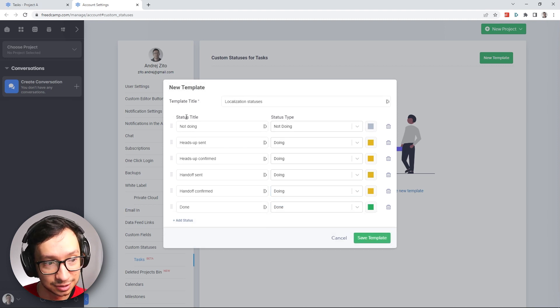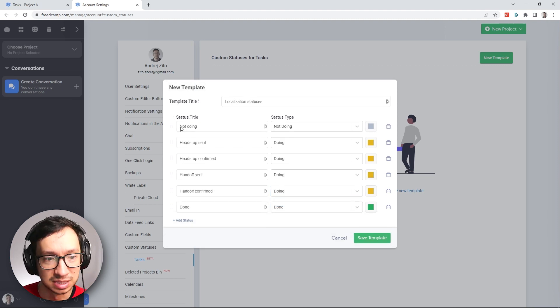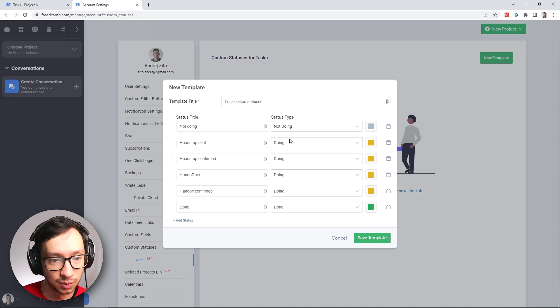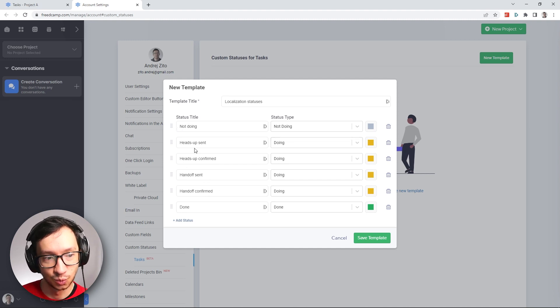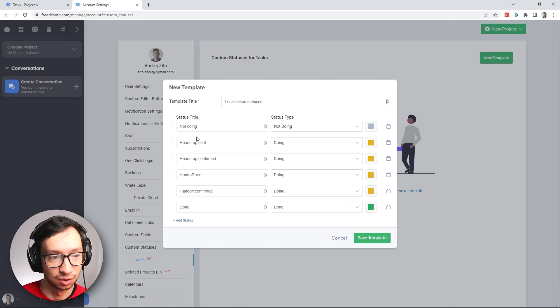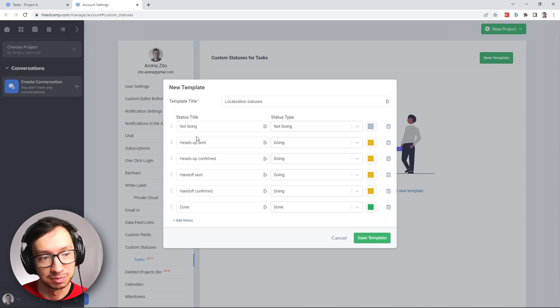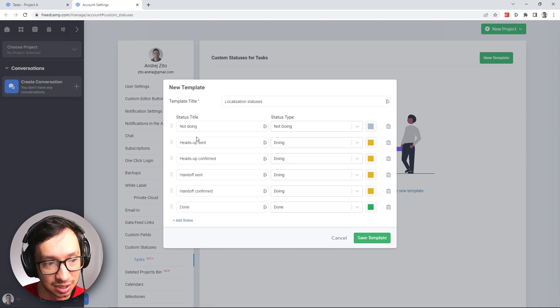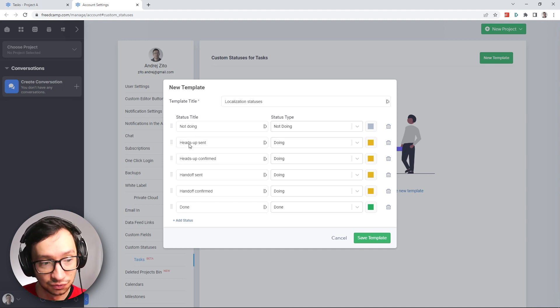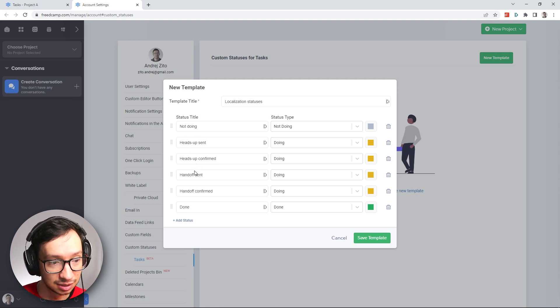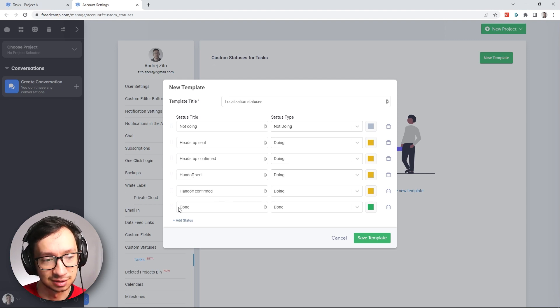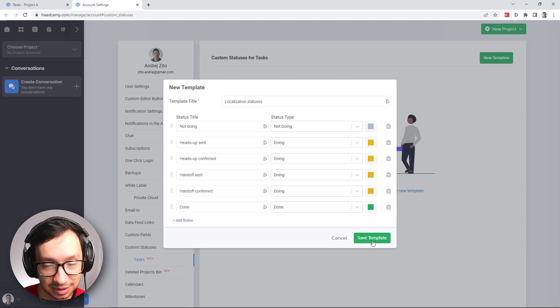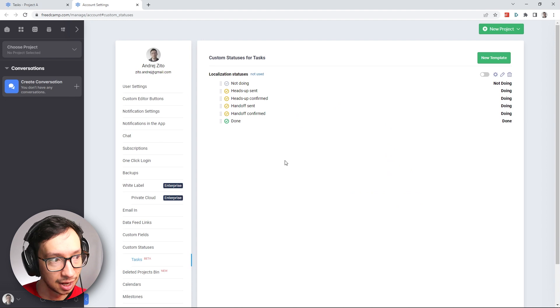So we have the first status for things that still need to be started. And then we have a bunch of smaller statuses which are for tasks in progress. But it means that we either sent the heads up, the heads up was confirmed, the handoff was sent or handoff was confirmed. And then we have the final status, which is done. Now we can finally save this template.